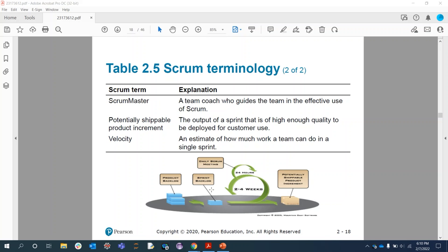Whatever is assigned needs to be completed in that particular sprint, so that the project development stays on track. Part of figuring out how much they can commit to is creating a sprint backlog, which is a list of tasks needed to deliver the selected product backlog items. At the end of each sprint, the team produces your potentially shippable product increment.